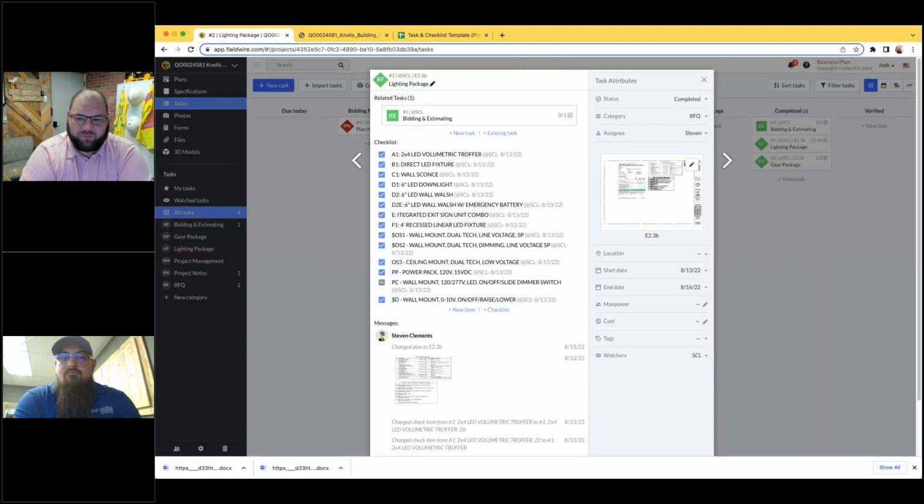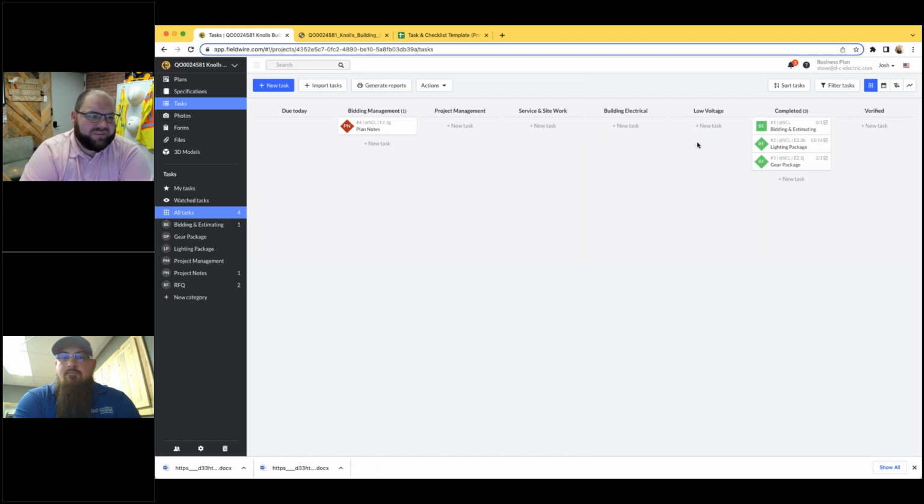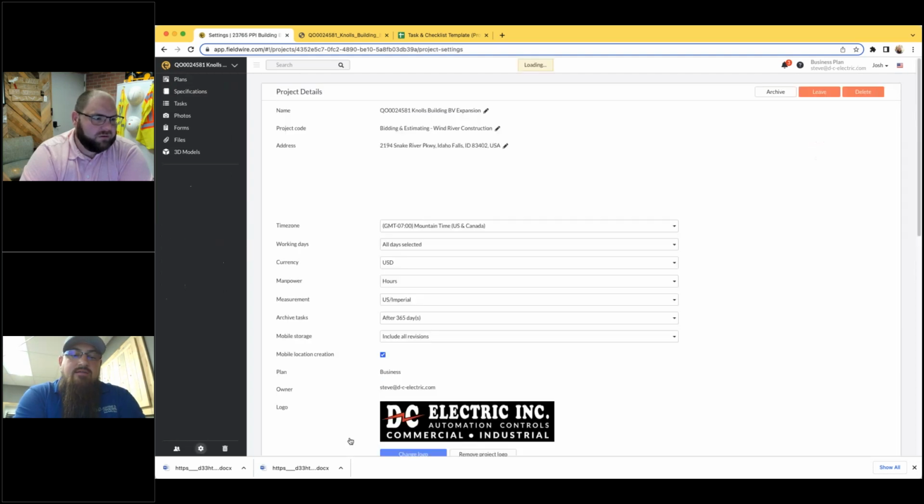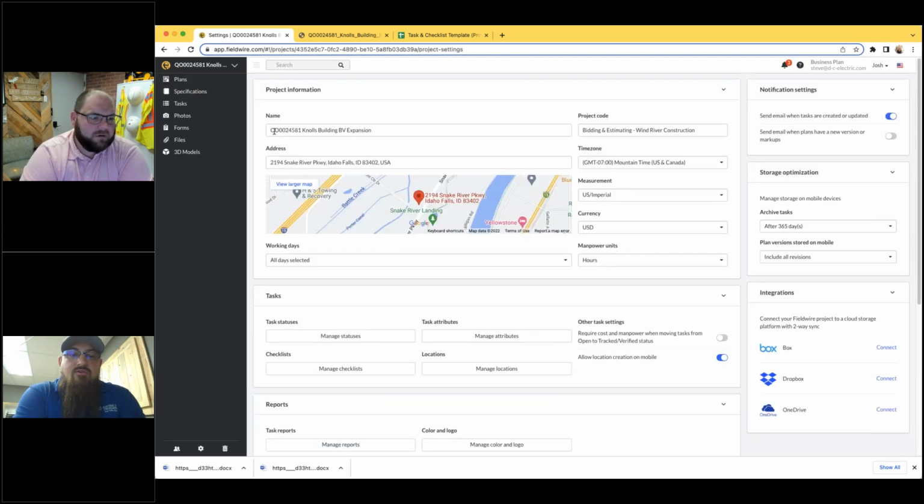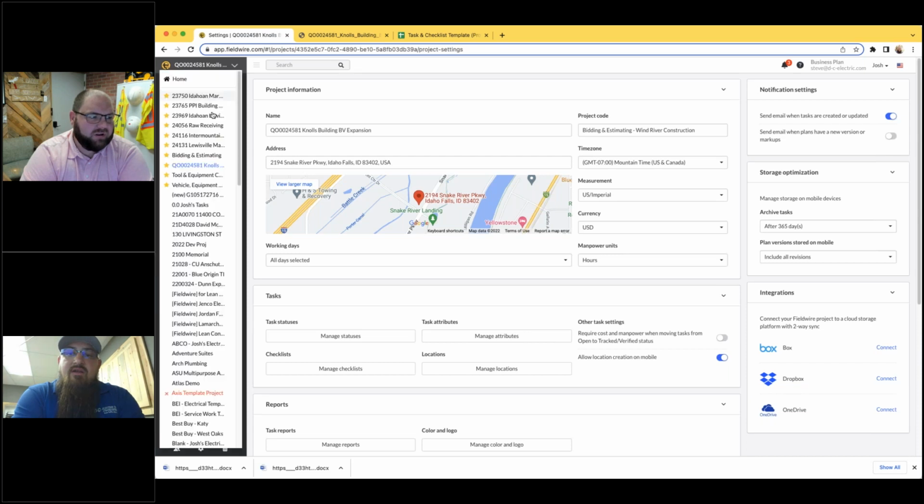One of the things that we kind of wanted to touch on here was when you actually get awarded the project and things are done, what do you do with it? Do you just create a brand new one and leave this behind? Nope. We go into settings and we just take that quote number off, and it becomes an active project. And then we change the project code so that it is no longer in bidding and estimating. It's for the general or the company that we're doing the work for. So it makes it very easy to start from quote to active. It's a very simple transition.